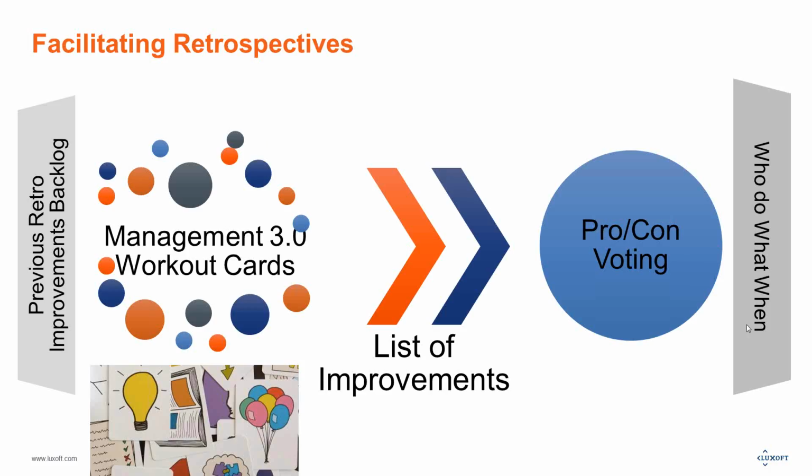I recommend you not to write that it should be done for the current sprint, or for the next sprint, or for 2 sprints ahead when you are answering the question when. But when should contain a particular date, for instance by July 20 or by August 10. It is easier then to track these improvements.